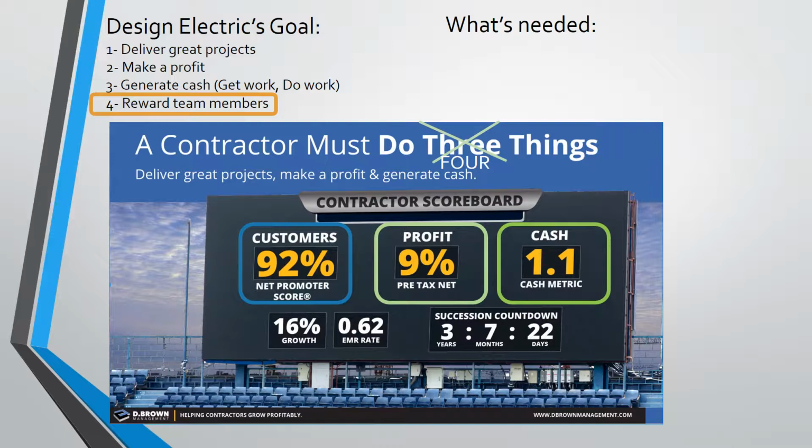Well, what is needed to accomplish these goals? Well, first, we have to be great planners. Projects that are able to beat the labor budget are being managed by foremen who consistently look ahead several weeks, several months, or even years. Using the short interval planner tool with Fieldman to forecast manpower makes this a lot easier. Additionally, using the purchasing department to get the right material at the right time, at the right place, and delivered to the right location requires great planners and will drastically improve our profitability.